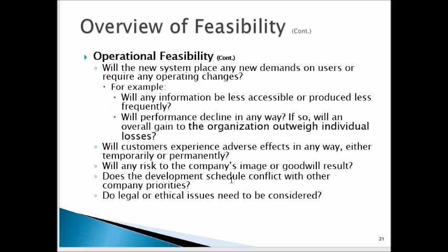Does the development schedule conflict with other company priorities? This is really common when you determine the development schedule at a college. There are different events that occur at a college throughout the year. There's registration, there's grading, there's different mods, there's different terms, and all that needs to be considered. You don't want to have a system upgrade on the opening day of registration. That's a classic example right there.